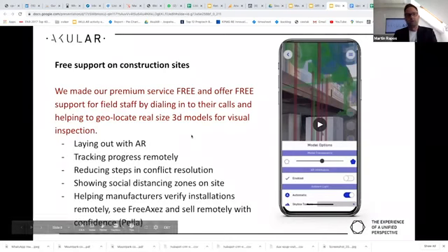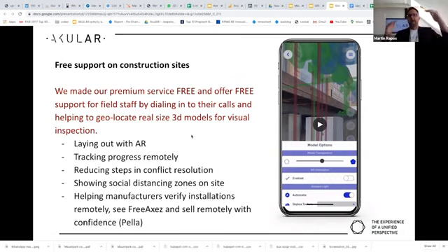Crews are actually working with the tool to lay out stuff with the AR to track the progress as they have their elapsed time to construction and elements of construction they're supposed to be seeing physically. But then obviously, if you are able to superimpose the 3D model onto the site, you are able to also see what is there physically versus what is supposed to be there, right?